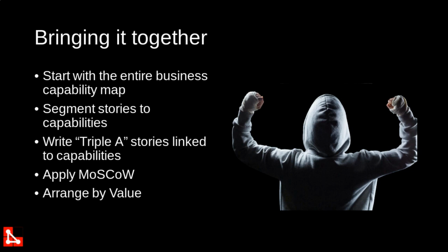Okay. Now, and finally, arrange those requirements by value. So is 80% of the value achieved in 20% of the requirements? Obviously, you start with the most valuable thing first, right? You want to achieve that value. And then you can actually stop and say, you know what, it's enough. I'm already done. Extra money spent on this is going to cost me so much more money than the value I will never make back. There's no return on investment.